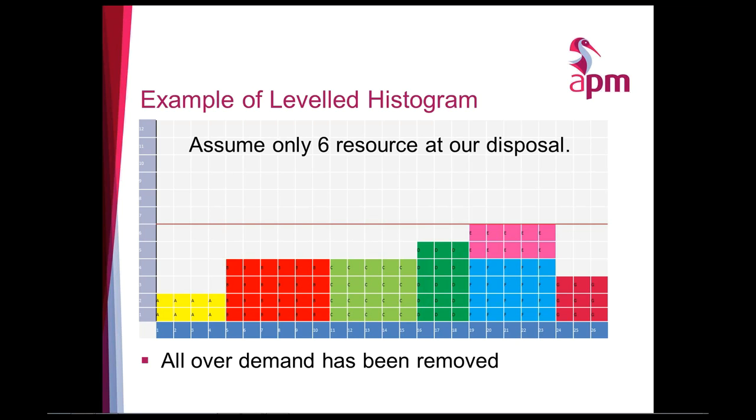What do you choose between Microsoft Project and Primavera? When we talk about the two systems, Primavera is a very good enterprise tool. So if you're doing an awful lot of planning as a company, you have many projects and many planners, then a good enterprise tool like Primavera is a good solution. Obviously, it's a lot more expensive, but if you're doing individual projects and you don't do a lot of project planning and you're getting into it, then Microsoft Project is a great way to go as well.